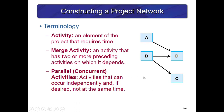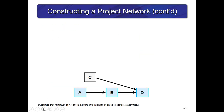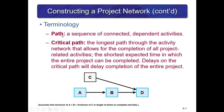In this example, D and C are not dependent on each other — they have no predecessor relationship — but they are both dependent on activity B. This is a continuation of that network diagram showing activity C feeding into D. The path is a sequence of connected and independent activities. The critical path is the longest path through the activity network that allows for the completion of all project-related activities — it's the path that takes the most time, which we'll figure out when we do the forward and backward pass through a network diagram.